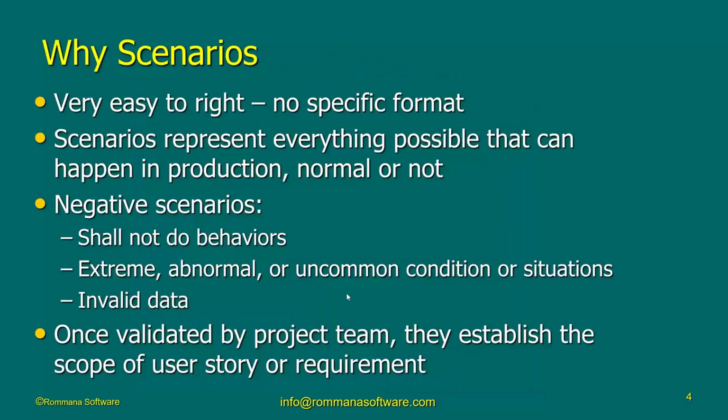Now, scenarios, of course, establish the scope of the user story. So during the scenario development and validation process, we ask questions like, is this really supposed to be covered by this user story? Yes or no? And of course, there will have to be a discussion with the product owner who would be able to answer this question. And sometimes we discover a lot of things that the user story did not even talk about, and that's very important. And sometimes we come up with lots of questions, a lot of scenarios that we discover are not really part of that user story, and they are outside the scope.